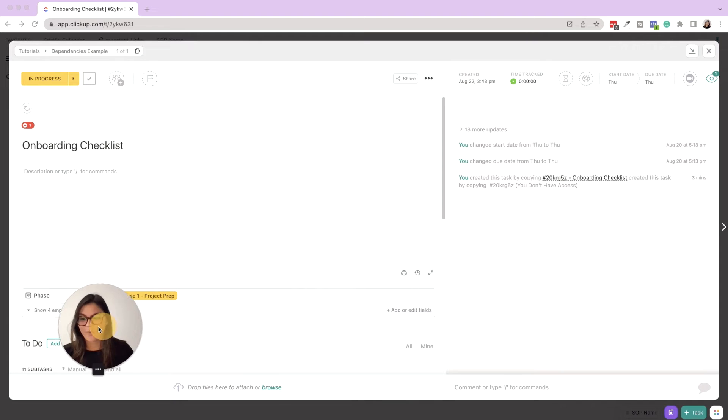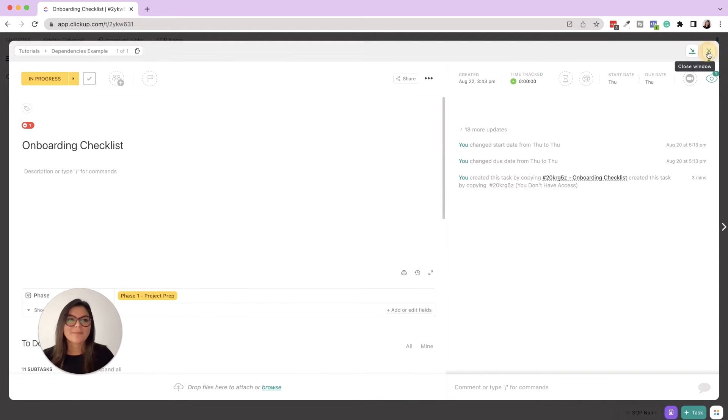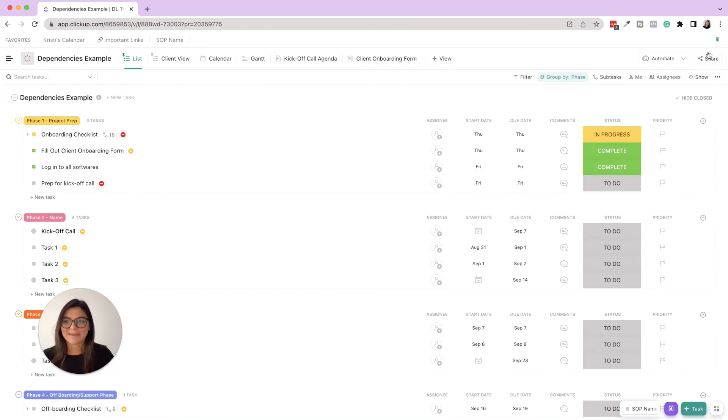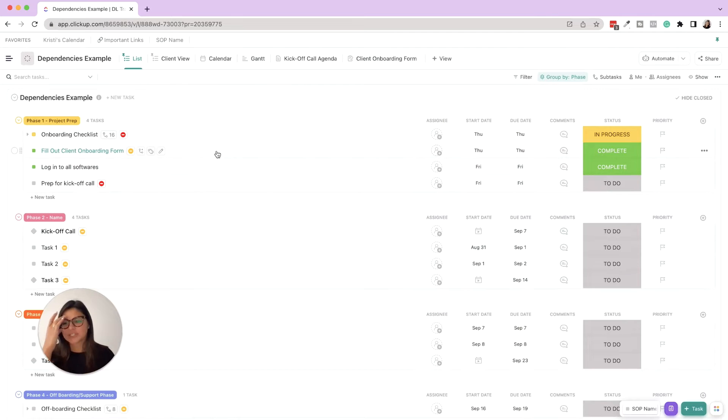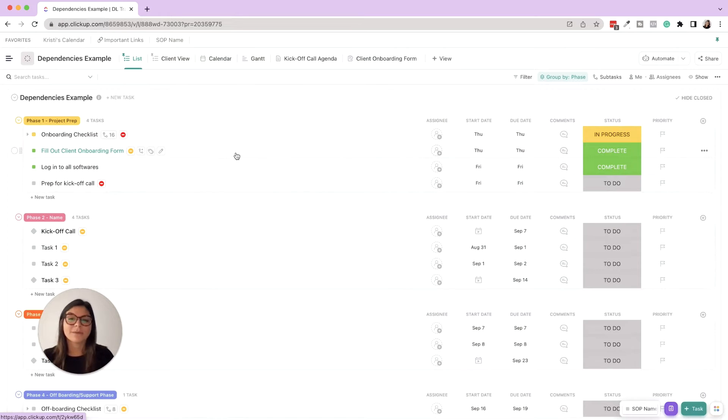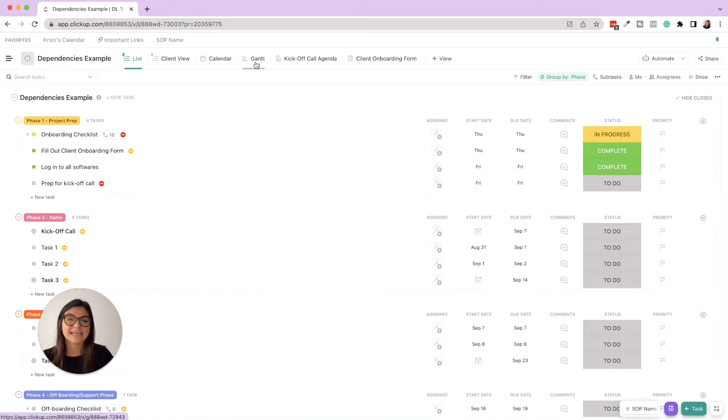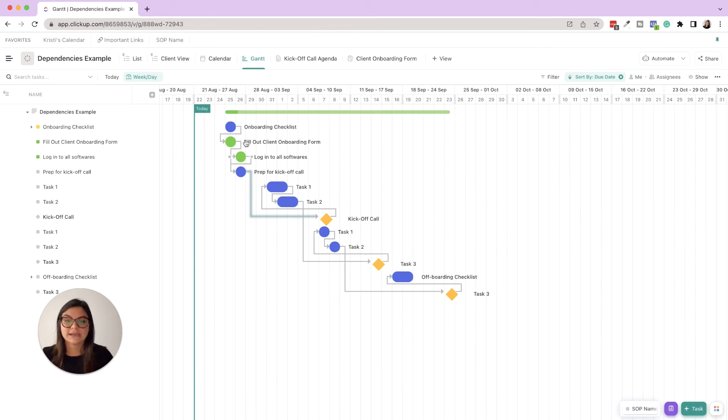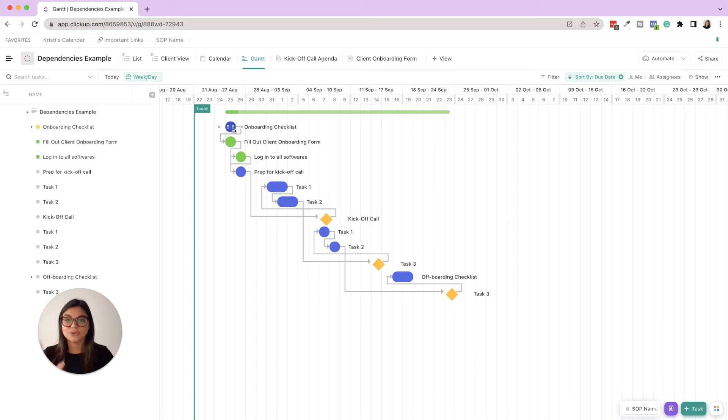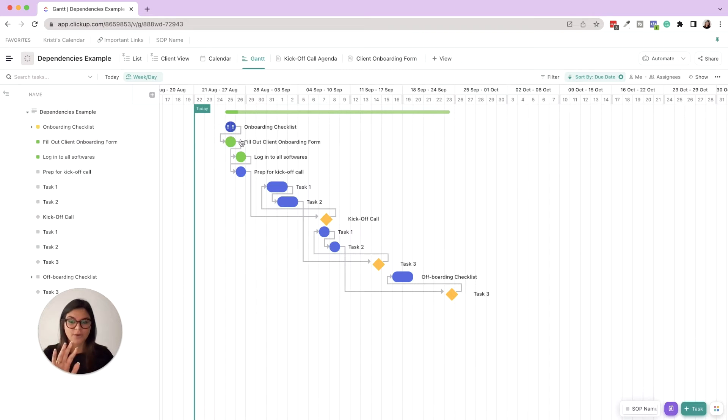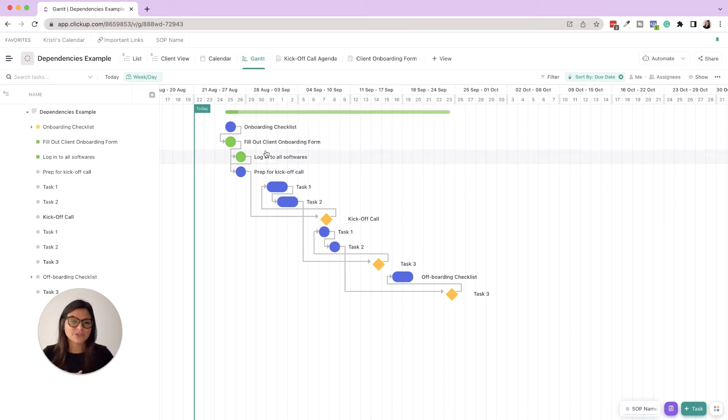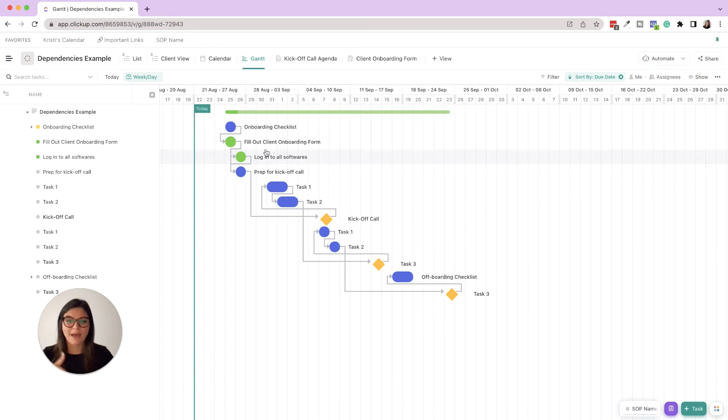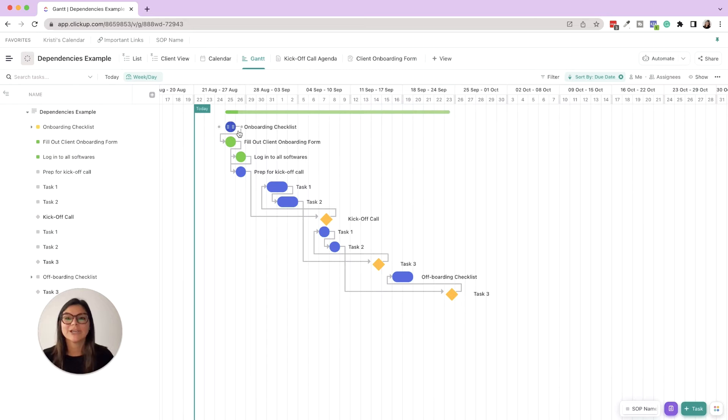So let's talk about mapping these and then what they actually do. A couple different ways you can map these, but one of my favorite ways is in Gantt view. In Gantt view is where you're going to be able to see - if tasks have a due date, they will show up in here. If they don't, they're not going to show up. So if tasks don't have a due date yet, Gantt view is not going to be your best bet to map these out, but if they do, by all means.